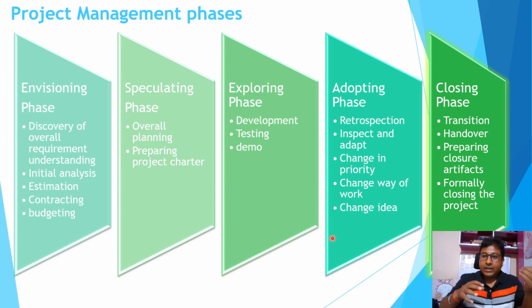Then the closer phase. Once you are done with all the deliverables, all the stories, and you are at the verge of completion, the closer phase will start. And it's not only about delivering the things and your job is done. You have to have a proper, formal closure of the project. You need to do the proper transitioning, proper handover to the BAU persons or whoever it is intended for.